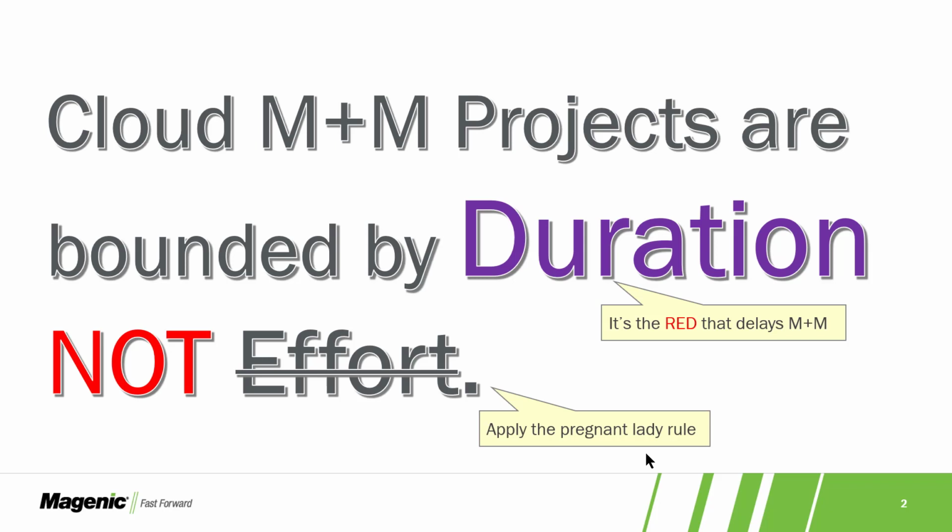But in a migration, that's not practical from either a budget point of view or a timeliness point of view. One of the rubrics that's true is the shorter you can make the migration project in duration, the more likely it is to be successful. At the outermost edge of that is 3 calendar quarters, or 9 months. Based on that wisdom of doing migration after migration after migration, we have come up with an approach, and we're going to talk about it.